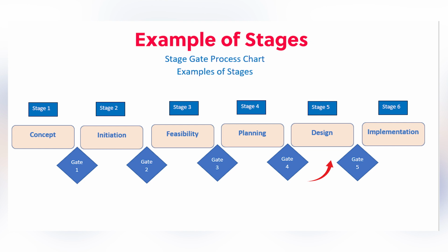Now, at this stage, generally, this will be the last stage that funding is released. Some organisations may want the delivery or implementation part split up, but generally, once they've got to the design phase and they're happy with the design and that they think it's a deliverable project, then the funding will be released for the rest of it. And then, of course, you may have one for closeout, which would just ensure that you'd had all the sign-offs that were needed to close the project out.